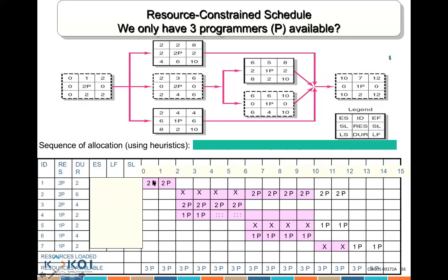So you notice that I have a slack, which means activity 4 could be delayed for 2 days. Even if we delay it, it's not going to delay anything else. Why? Well, activity 4 has to wait for everything else to finish before this activity could be completed. So instead of waiting, we might be able to delay activity 4 by 2 days and still finish on time.